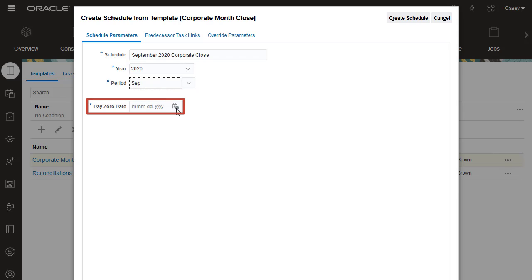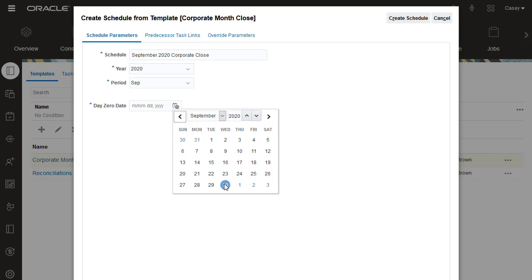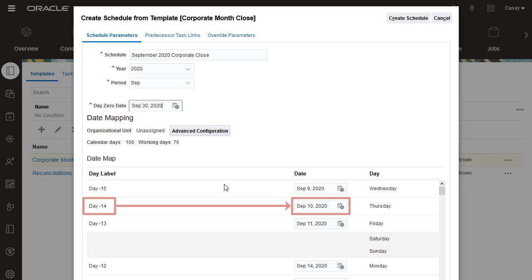Tasks are scheduled based on the date that you select for Day Zero. Each task is assigned a calendar date based on the number of days before or after Day Zero that it was assigned in the template.